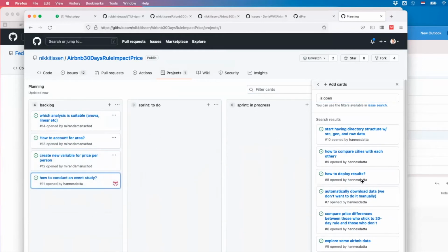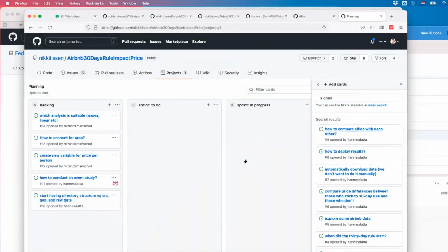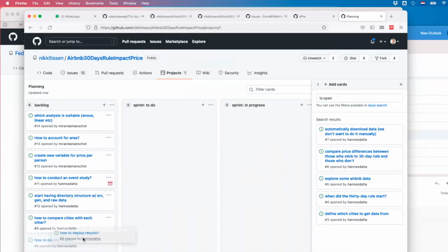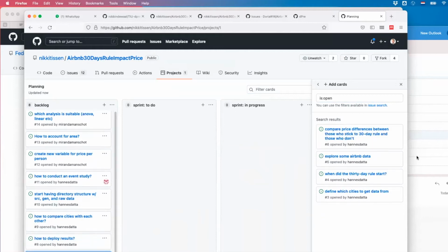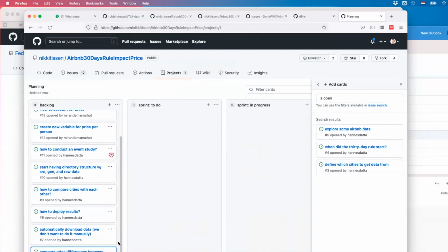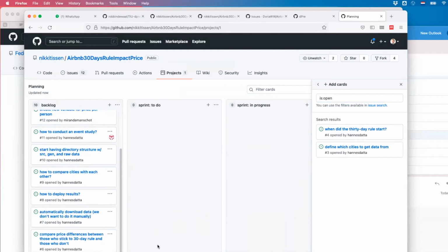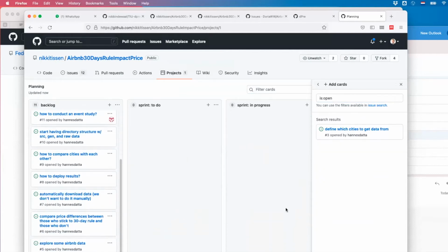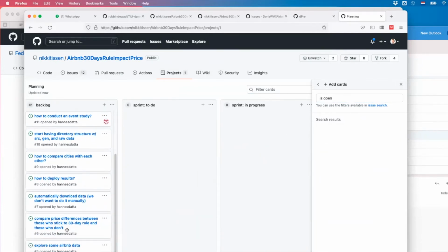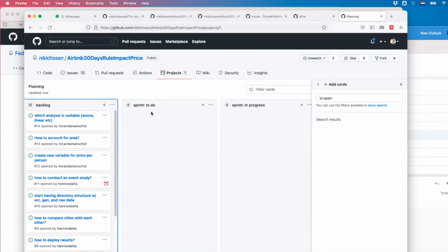I'll quickly show you. What you need to do is decide as a team what stuff to work on in the next week. You don't even need to be in class. You can also have a meeting on Monday and a meeting on Friday. You find your rhythm. But the way this goes is as follows: one of you is a team captain, and then we open up and plan our sprint.